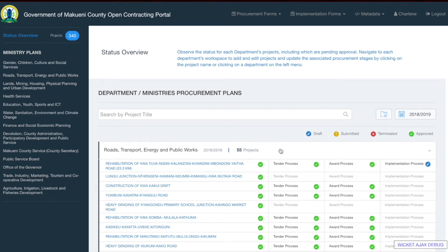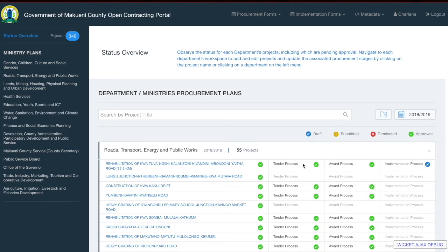To clarify what each process means: the project process shows the project name and the status of the project form. The tender process is an aggregation of the statuses of the purchase requisition forms, tender document, open and evaluation form, and professional opinion forms. The award process is an aggregation of the statuses of the award notification, acceptance, and contract forms. The implementation form aggregates the status of the administration report, inspection report, PMC report, MNE report, and payment voucher.